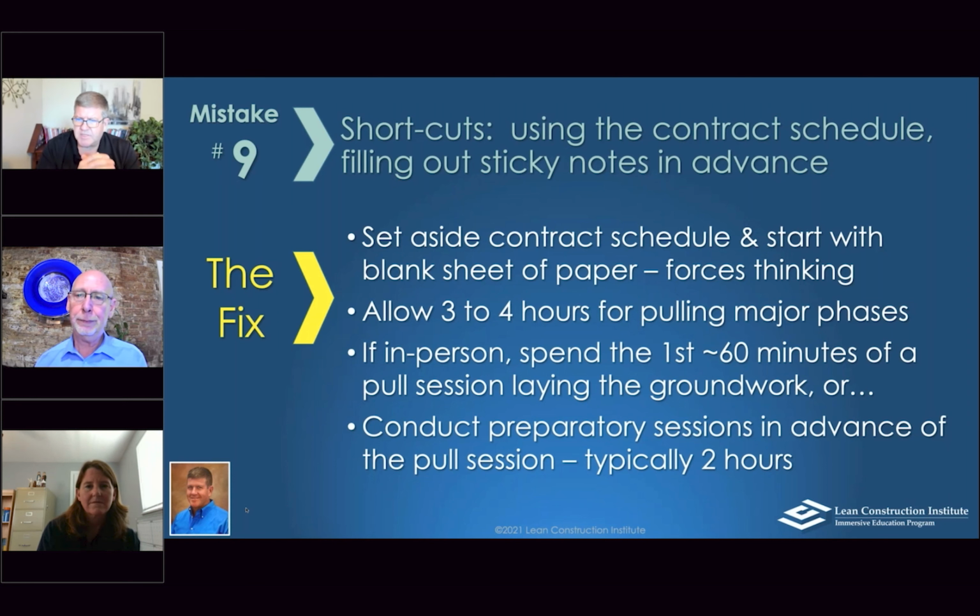If you're doing them in person, the third bullet there, I usually spend the first 45 minutes to an hour just setting things up. If we did not do a prior session, if it's the first time everybody's coming in, you really have to lay out that groundwork, and I'm going to talk about that in mistake number 10 coming up. And do those prep sessions. That became a real necessity during COVID, and I think it's definitely a best practice, and I'm going to continue to do it after COVID.